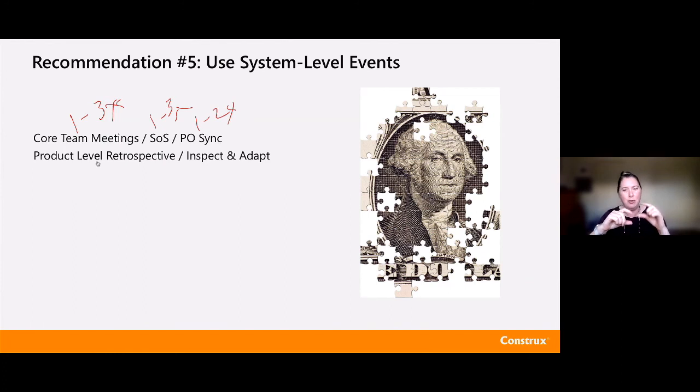Right? The teams probably need to do better refining, maybe need to up their game in the definition of done, maybe there's some role gaps that we need to address. But the organization perhaps needs to be investing in our build system because it takes us 3 days to move things from a developer's machine into the QA environment for the QA testing we want to do inside of a sprint. Or perhaps we've got metrics in place that de-incentivize people from working with each other. Those are issues no one team can fix, but if I fix them, I make the whole system better. So I need a forum for doing those kinds of things.